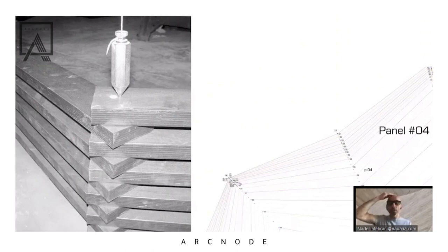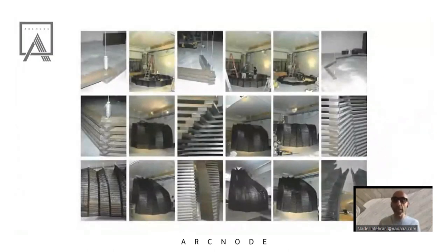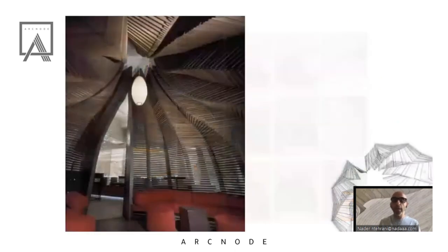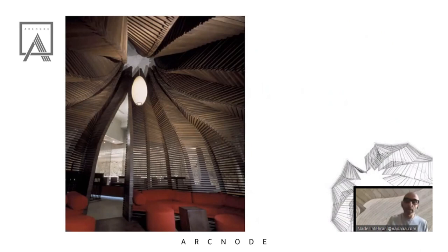It didn't make sense. So we decided to make a mock-up inside of our own office, stacking plywood layer by layer from a drawing that we ourselves had made, hanging a plumb bob from the top down, and realized that we could make 7 layers of these per day and probably make it within 30 days for about $30,000, leaving about $175,000 for construction of the rest of the restaurant. And by doing this, we co-opted that scope of work. We internalized it within our office. And by doing that, we're able to build this structurally rigid frame of the space within which this lounge occurs.